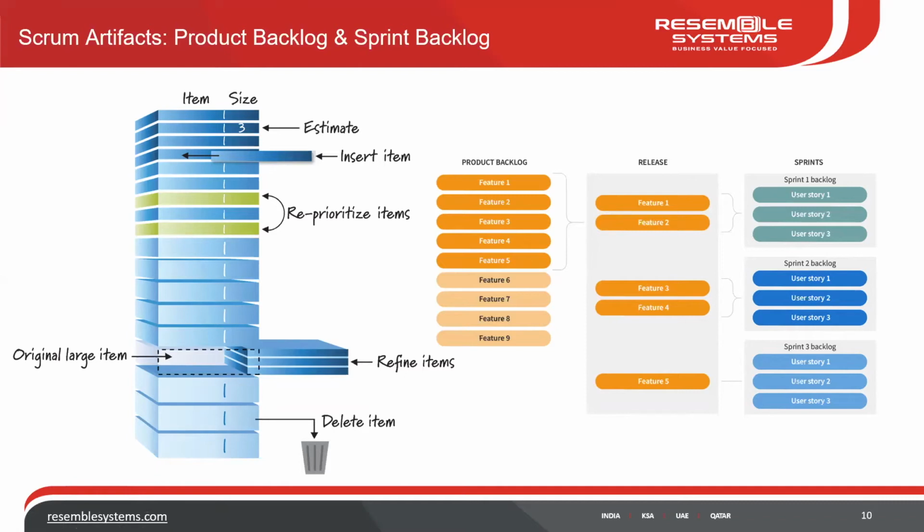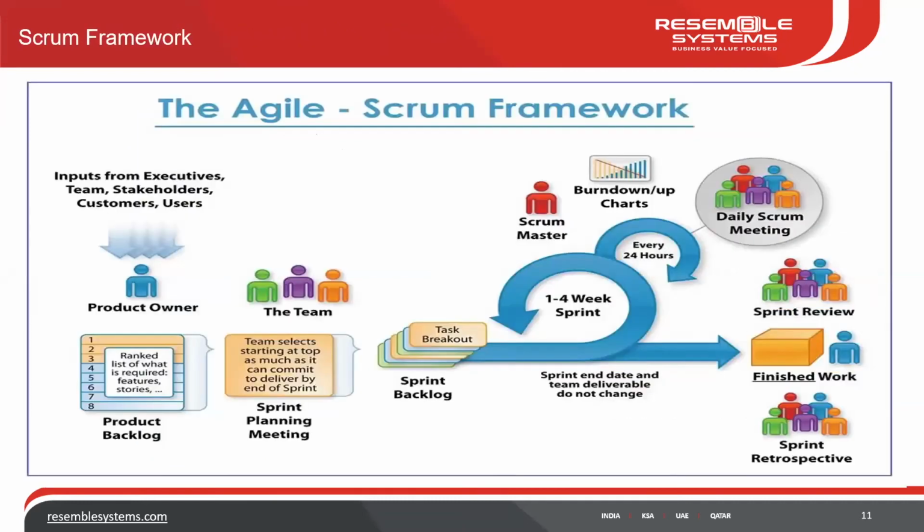And any change which comes, we take it as a change request involving financials, extending timelines, adding resources. So this is the advantage of doing agile, right? The customer and the product owner can immediately talk to each other, collaborate, and say which feature is more important to the client, which has to be released in the next cycle, say maybe in a month or 2 months. So this is the product backlog and the sprint backlog.